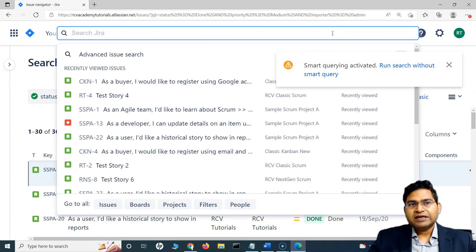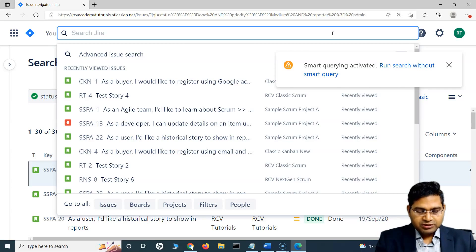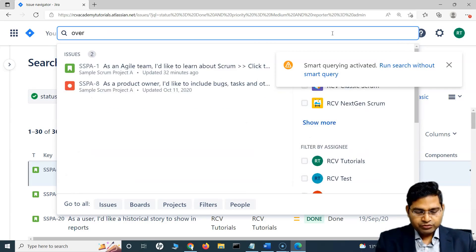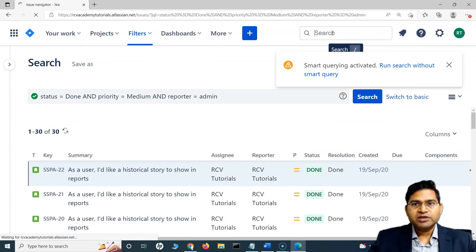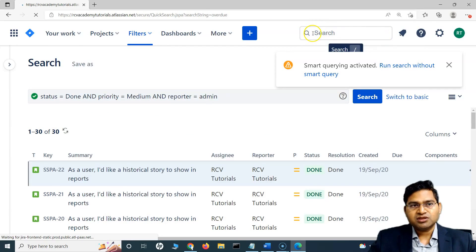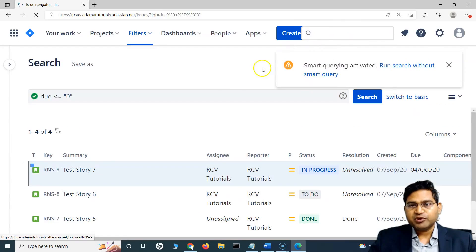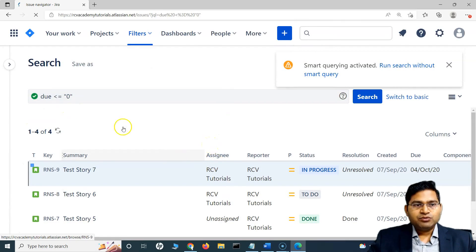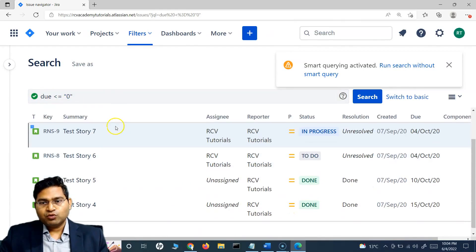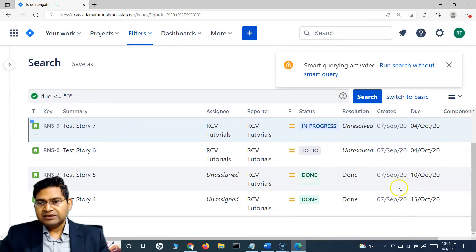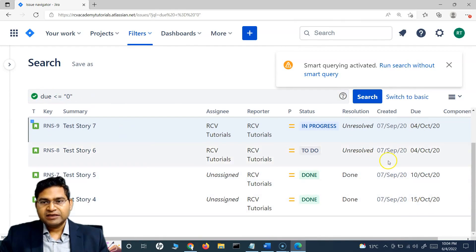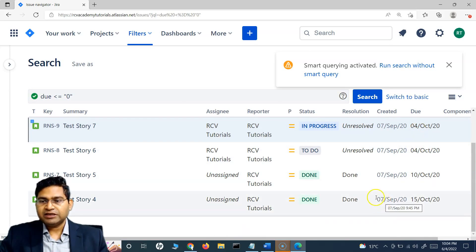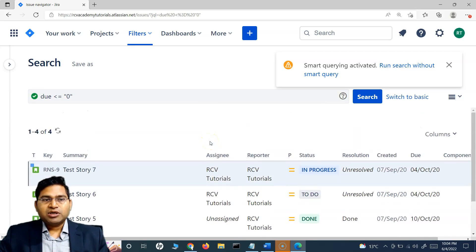The next thing I want to cover is how to find overdue issues. The keyword is simply overdue — that's it. Just type overdue in the quick search and hit enter, and you will see it automatically creates a query for overdue and displays issues that were due and are already overdue. This is how you search for overdue issues.